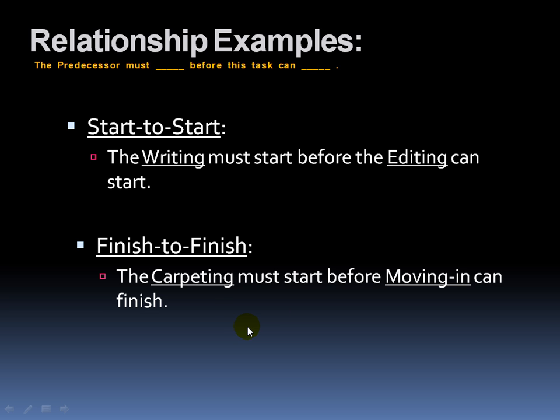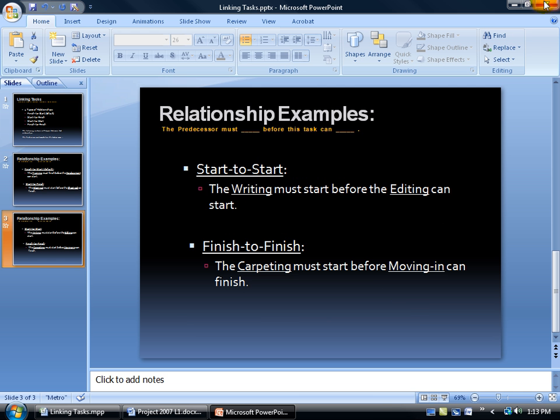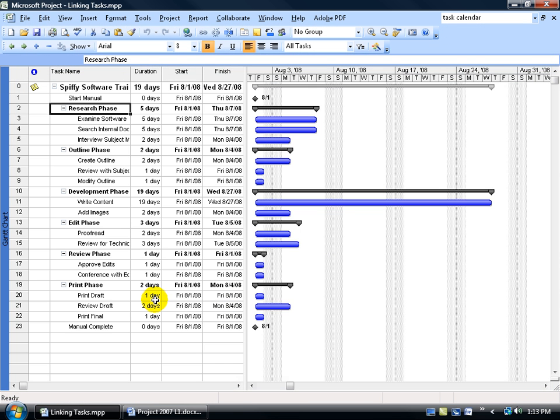Now finish to finish. The carpeting must start before moving in can finish. Like I said, the example is not the greatest, but think about it. If you're laying down carpet and somebody hurries and moves in everything before you actually finish carpeting, then you're going to have some of the furniture on the carpet, some of it off. So you have to finish carpeting the whole house before you can actually finish moving in. Break it down a little bit further. You can carpet the bedrooms, but you haven't finished carpeting the house, right? Or maybe you carpeted half of a room. You could still move furniture in, although I don't recommend that. It's not good for the carpet to have them stretch and pull it with heavy objects on them. But I hope you get my point. Let's go ahead and close out of here and go back to our project and see it in action.